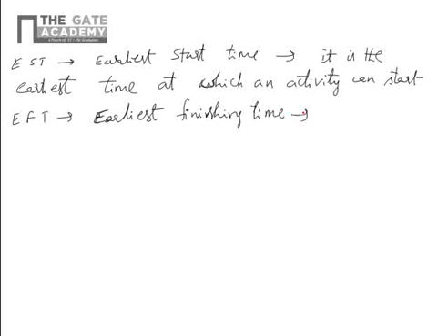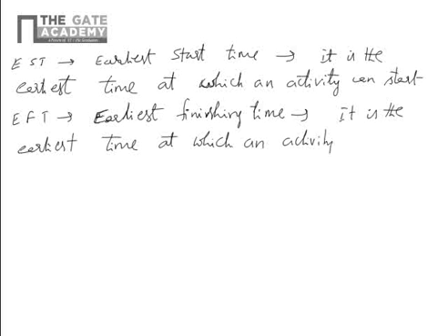It is the earliest time at which an activity is completed. EFT is equal to EST plus duration of that activity.